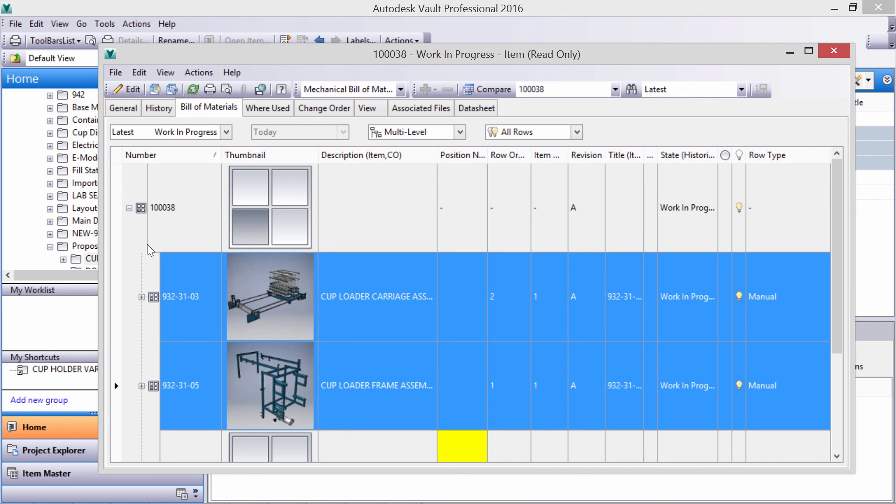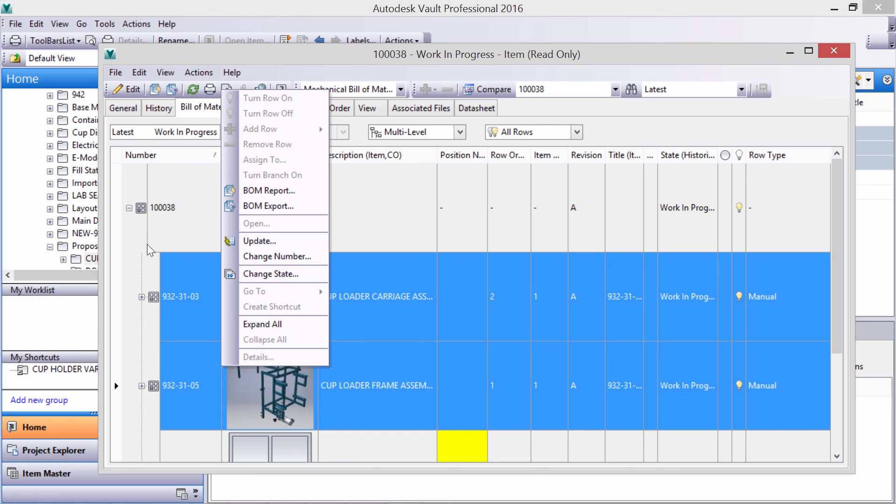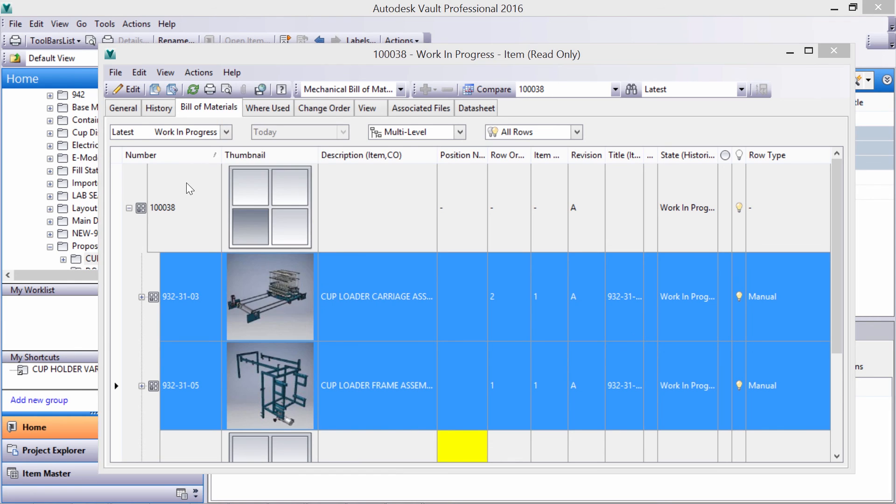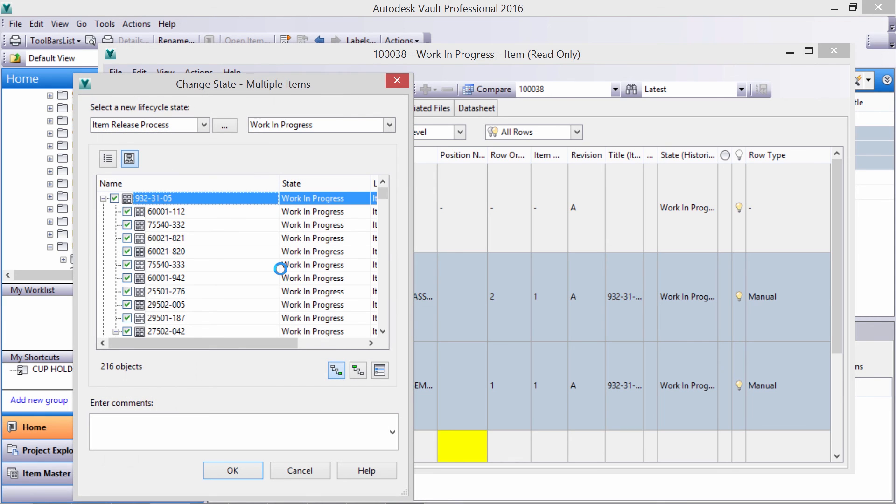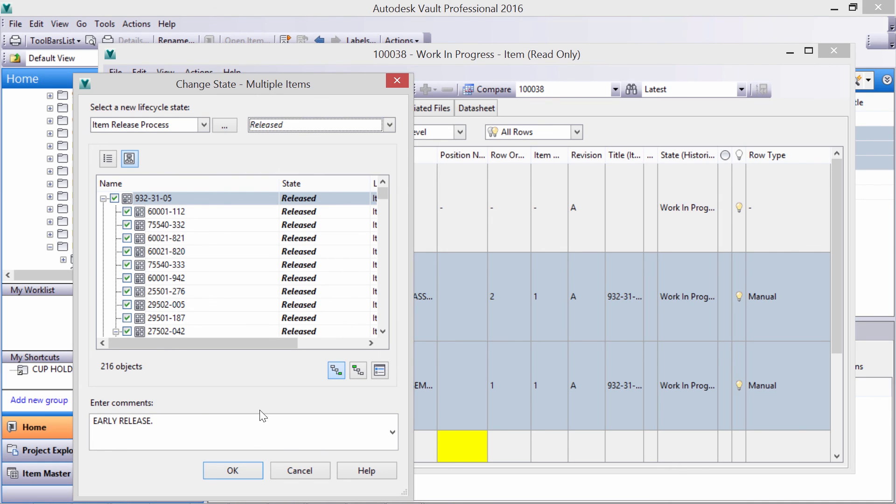The other sub-assemblies have longer lead times, so we can release those to procurement and supply chain, allowing us to focus our attention on the new assembly that needs design and engineering work.